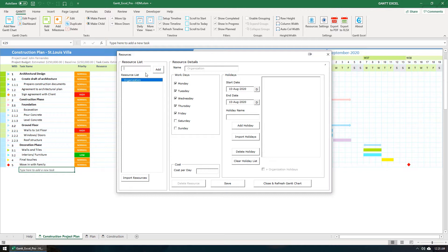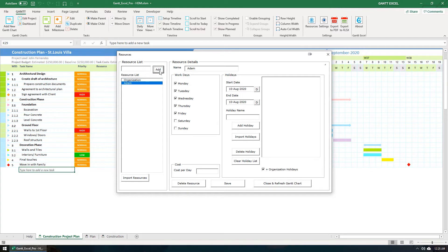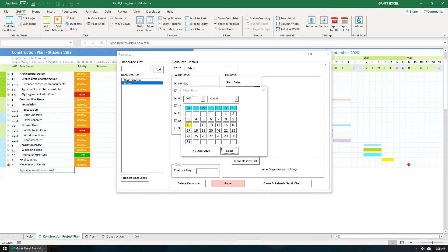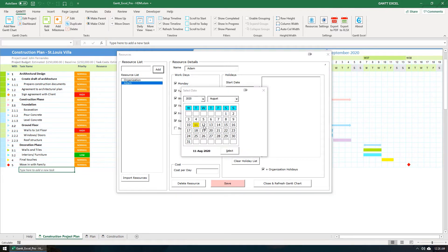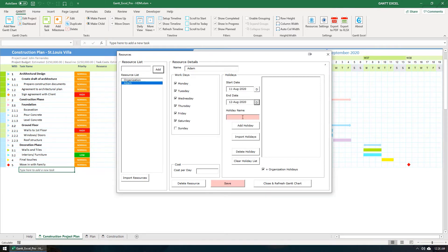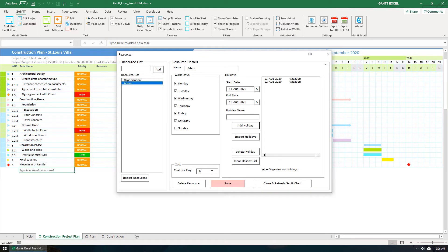Let's add a new resource. Type in the resource name and click the Add button. Let me set the workdays for Adam. Adam works from Monday to Saturday and will be taking a two-day holiday break on the 11th and 12th of August. Let's set the resource cost per day for Adam at 600 US dollars and then click the Save button.